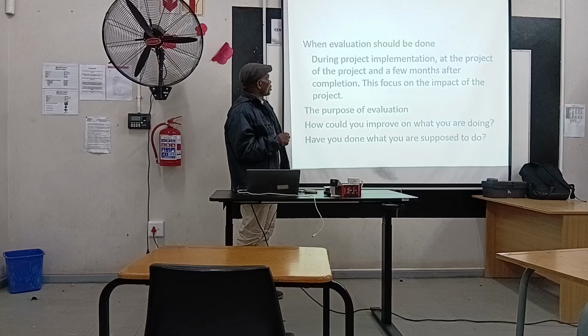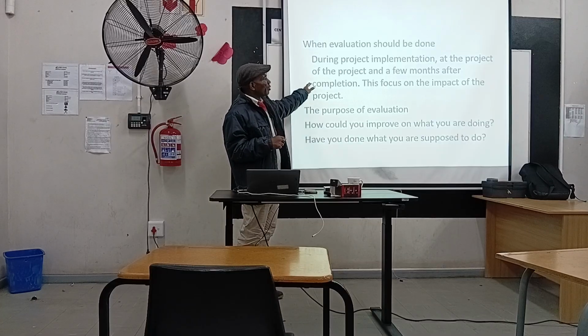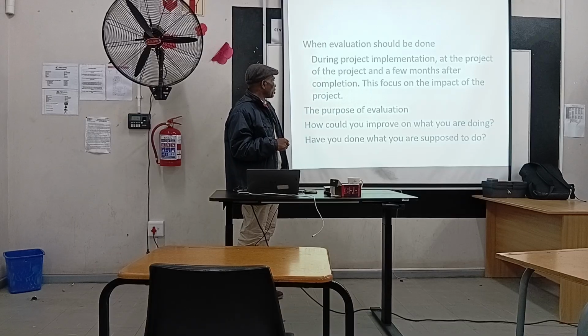Then you can do it a few months after the completion of the project, which is what we call a postmortem. The evaluation done a few months after completion focuses on impact.